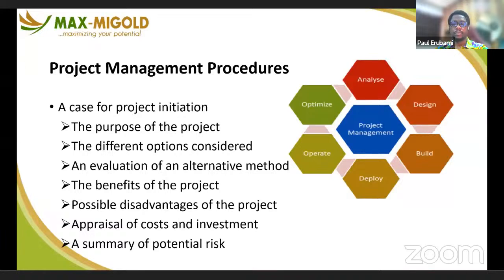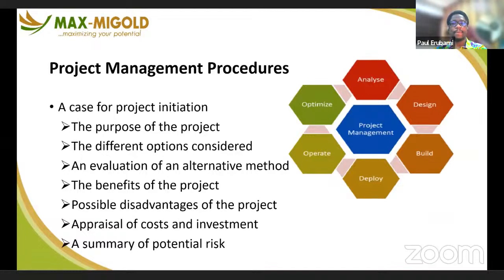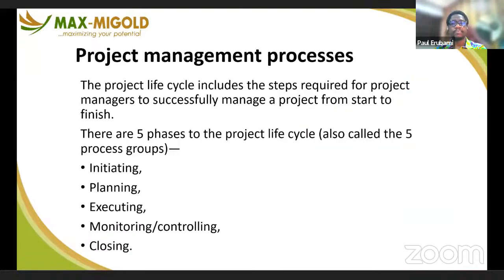You must know how to manage risks to ensure the project does not have any hiccups. For those of us in Nigeria, there is always a rainy season, and any project you run is subject to the weather. You cannot just say the project is being disturbed by rain when, as the project manager, you should have planned for that disruption. Between March and August or September is rainy season, and you must adequately plan for it because it is a risk that may affect your project.